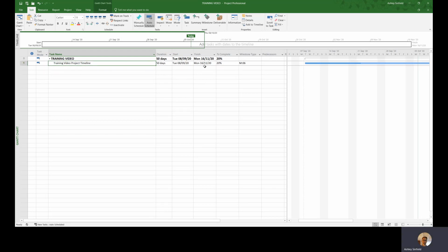Anyway, I'm happy with my project, so I'm going to save and publish it back. Saving actually only saves a local copy for myself. It does not promote changes back into the cloud system. Therefore, publishing is what we must do to promote these changes. This will allow the reporting to pick up the changes and anybody else in your project team to see the changes. It will also save the changes you have made. Therefore, I would always recommend just clicking publish because it will do everything for you and you can just ignore save. We'll do that now.